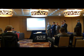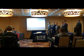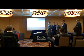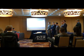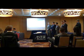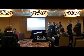We did find one side stream water filter in an adjacent building of the chilled water lines that we will be tying into, but we don't feel that this is going to be sufficient for the owner due to calcium buildups in the area. So we'd like to value engineer in a few more water filters when we submit our mechanical scope. Another element that we talked about yesterday with the owner was the large air handling unit on site.